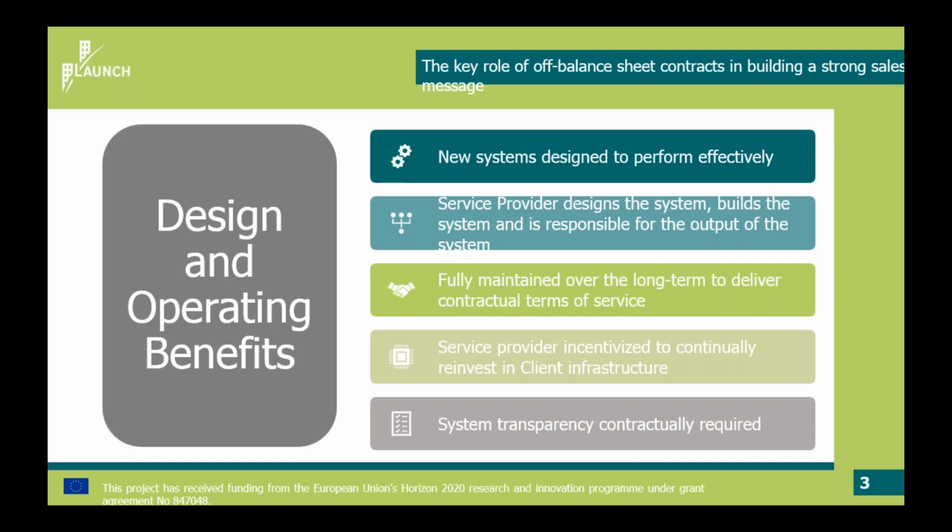Another important attribute is, unlike your traditional contracting models, in the off-balance sheet EPC case, the service provider is developing, designing, building, owning, and servicing the infrastructure improvements. This means that there is no disaggregation among service professionals, or I guess pointing the finger after the fact, clearly a huge benefit and risk mitigation factor for clients.